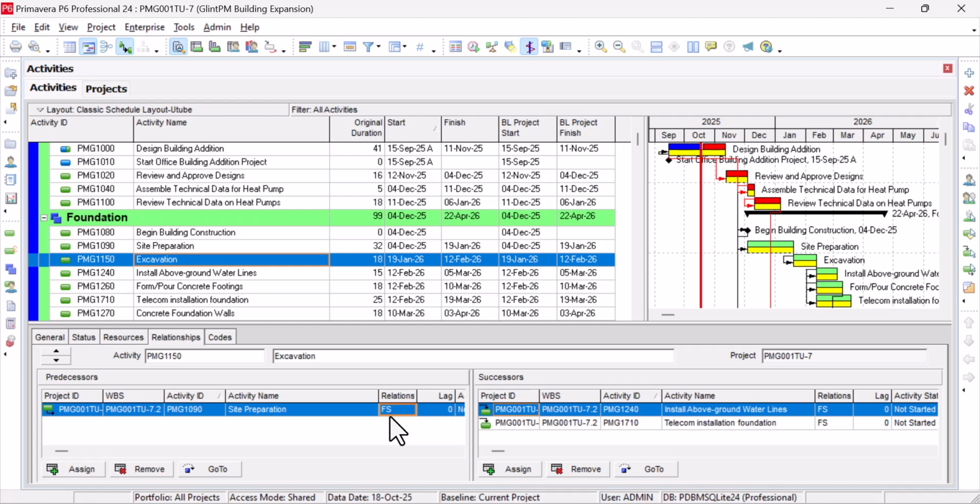Meanwhile, you may want to lay pipeline or do foundations for your buildings. You can actually do part of the excavation alongside the site preparation, so you don't have to finish the site preparation first. This becomes a simultaneous operation, what we call concurrent activities that you can do together.